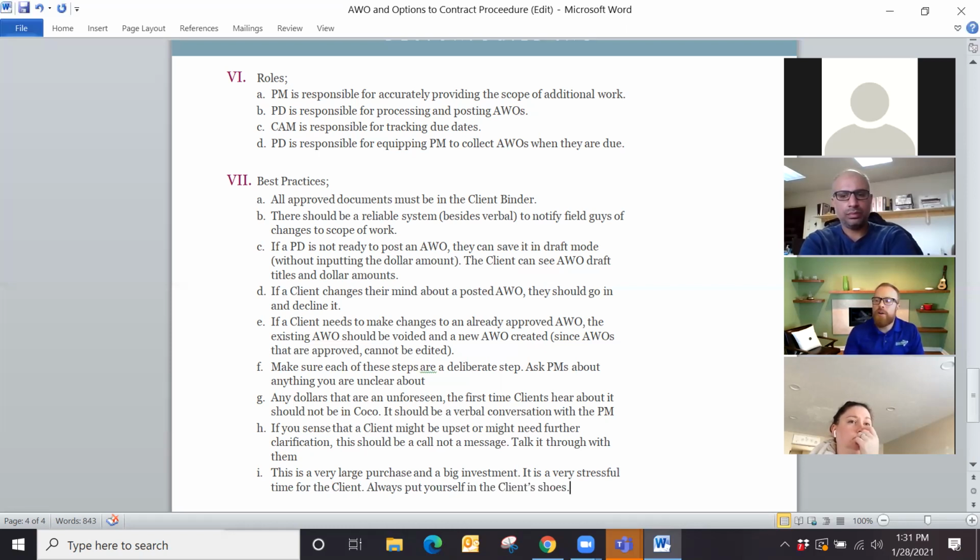So that needs to somehow, because I think, following that up, the PM would then get to the next production meeting and give an update on the job. Well, the job completion just got moved back 1 week, which is kind of what Elizabeth was implying. Mm-hmm. And the reason why is because we just added painting, hardwoods, and recessed lights, and whatever else that we're doing. Yes, that should be part of it. It would be the completion of that communication. Yes, agree.